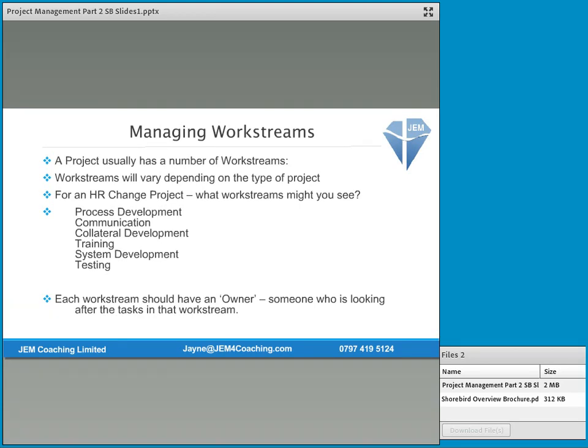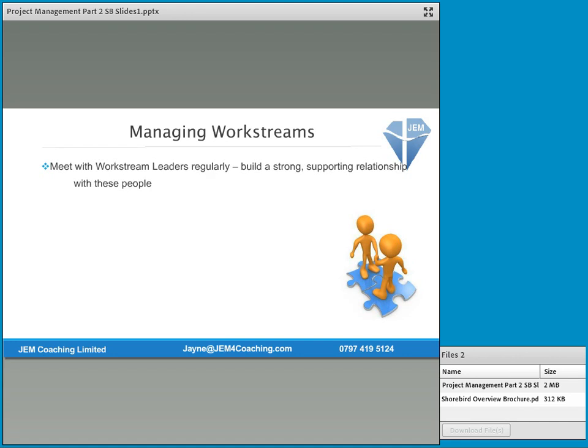So moving on again with managing work streams. We've got a little bit for the project manager. As well as encouraging the work stream leaders to talk to each other, it's really important that as project manager you meet with the work stream leaders regularly, and that it's a strong supporting relationship with these people. You really are there to help them, to monitor them, to check that things are working as they should. And you're going to record their progress on the overall plan. They might have access to the project plan, they might be allowed to update it, but you really want to record their progress on the overall project plan so that you can see what's going on.